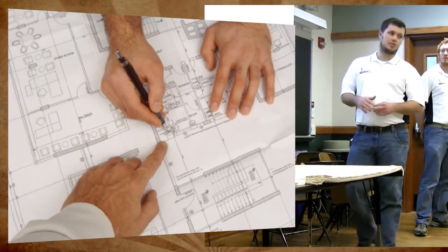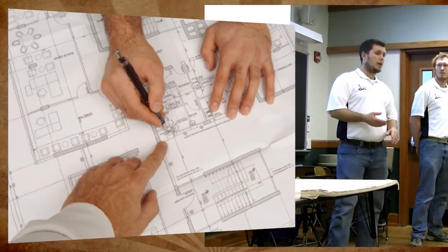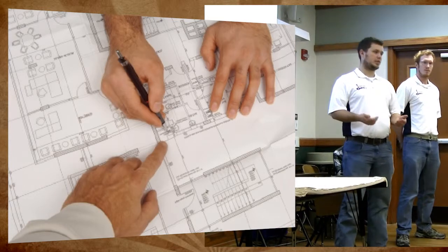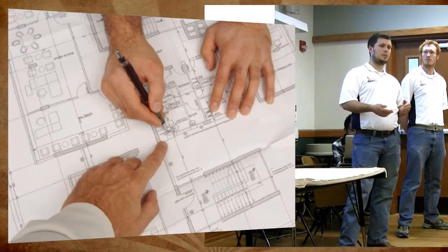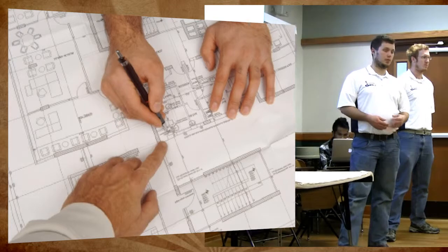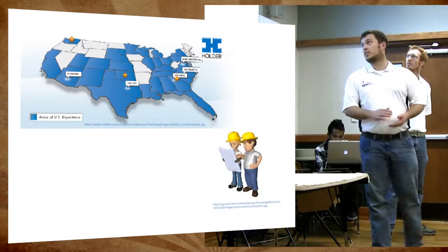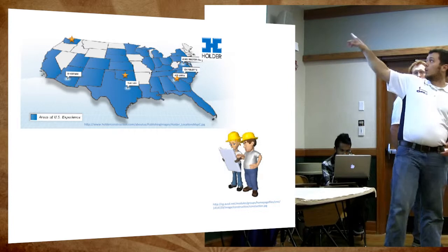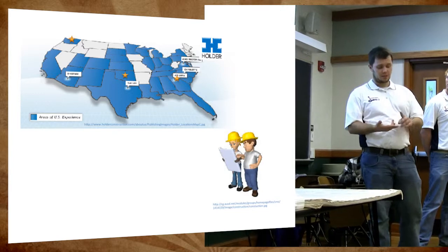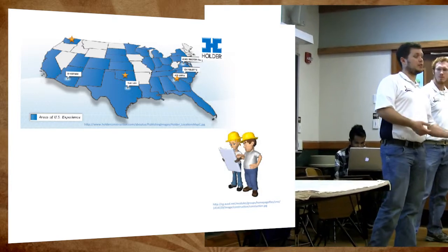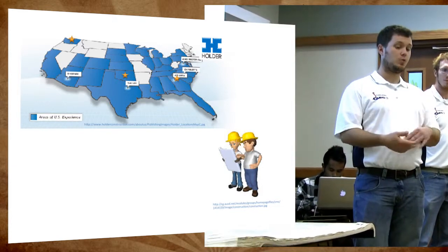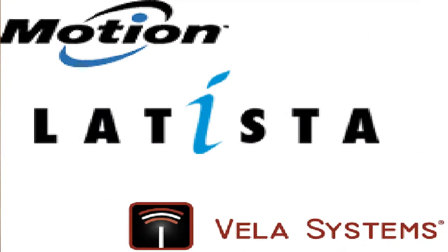What we focused on this semester in particular is quantity tracking. We developed an app that tracks quantities so that, for example, at the end of a month, when a subcontractor says, we have 85% of our scope complete, we can check and verify that percentage so our cash flow reflects it. We're testing in Quincy, Washington, Oklahoma City, and two job sites in Atlanta. We sent the tablets to superintendents, project engineers, and project managers with a script. They go through that script, and the information that is logged is sent back to us via FTP sites so that we can record our data.